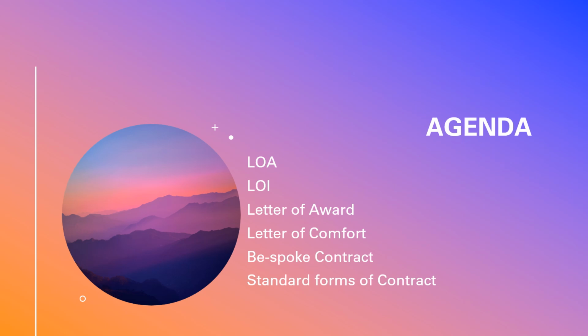It's not an acceptance or a contract, just expressing your intention to have a contract with him at a later stage. A very important thing to keep in mind is that a LOI is not a legally binding document. Why? Because if it had to be legally binding, it should have an offer, an acceptance, a consideration, and all other ingredients which will form a valid contract.